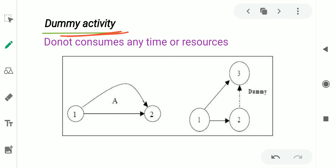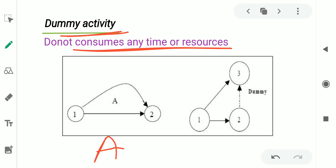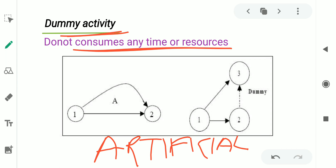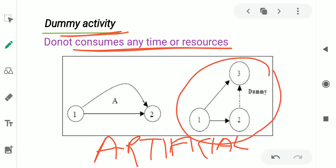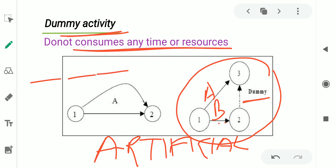To cope with this situation, we introduce dummy activities. Dummy activities are activities which do not consume any kind of time or resources. They are artificial activities introduced to maintain the logic of the network and the relationship between predecessor and successor activities. To maintain the relation between activity A and activity B, we introduce a dummy activity, which is shown by a dotted arrow. Dummy activity is a large concept and a separate topic, which will be discussed in another video.